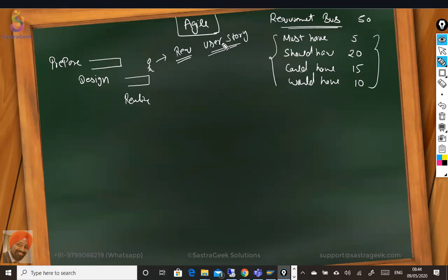The benefit of putting a user story is that whenever business speaks and whenever business users write, they would be thinking again about the requirement, and they would be giving more precise requirements. And if the requirement is kind of a wish list, it doesn't come in the pen down. When they write down, their wish list automatically gets removed. When they need to exactly write what business benefits will come out of it, many of their small wish list items, which would not have that great impact to business, would automatically go out.